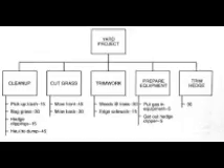Now, let's say cleanup. Cleanup will take how long? Cleanup, by the time you calculate all the activities you need to do for the cleanup would obviously take 105 minutes. The cutting of the grass, you have mowing the front 45 minutes, mowing the back 30 minutes.